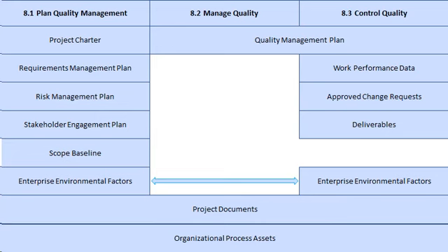Crucially, a project manager should rely on a specialized team, ideally one that is not part of the project, to carry out these evaluations rather than directly taking on the function of a quality management auditor. The success of quality management initiatives is frequently increased by this outside viewpoint, which offers a novel and objective perspective.